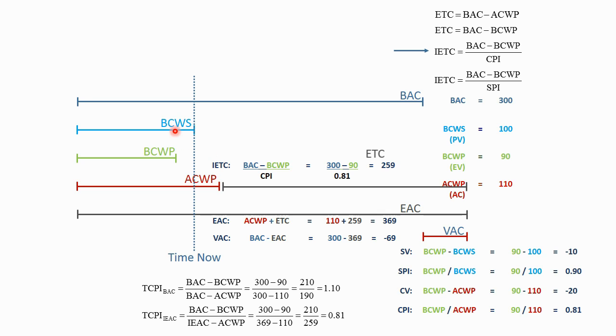So again, we could replan the budget cost of work schedule, and the CPIs could be 1.0 in the future, going forward in the future. But we don't like to replan. It's much better to baseline the plan, leave the plan in place, and going forward, just measure the project based on a cost performance index of 0.81.